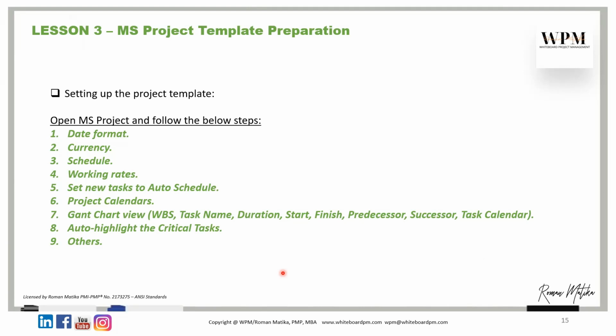The template needs to be well prepared. Once you open Microsoft Project, follow these formats. Open date format, set your date, set your currency correctly, set your schedule correctly, working rates, set new tasks to auto schedule. Project calendars: put all the project calendars if you are working on site or in another country.